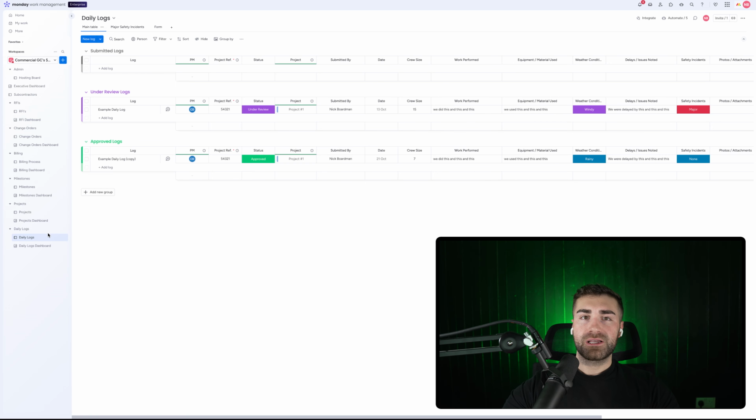So, data that is submitted by a subcontractor regarding a project for the internal team to review, make sure that they're happy with the documentation that's been provided. If there are issues, they can then escalate it to the architects or engineers. And then if they want to reject it, they can do. And then also just being able to track that information in association with the projects themselves.